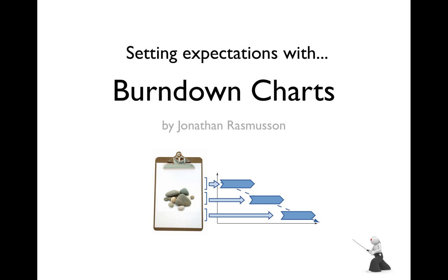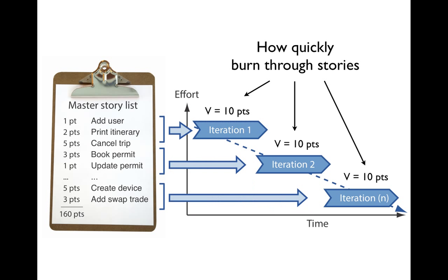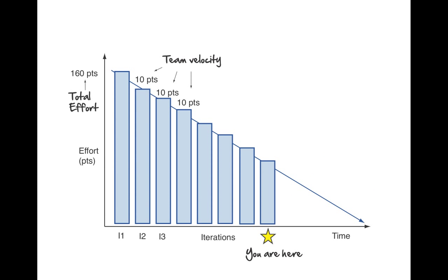Here we will review what the burndown is, what valuable information it can give us, and the important role it plays in helping us communicate the state of our project. In a nutshell, the burndown is a chart that shows how quickly you and your team are burning through your customer stories. It shows the total effort against the amount of work we deliver each iteration — something like this.